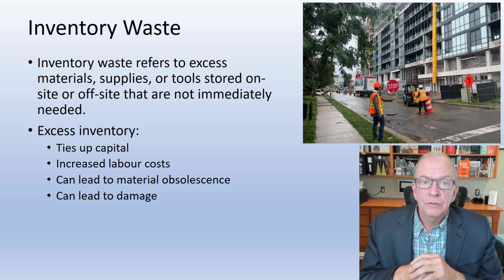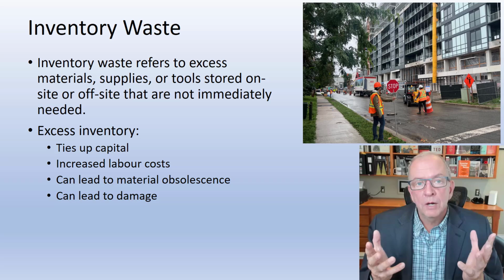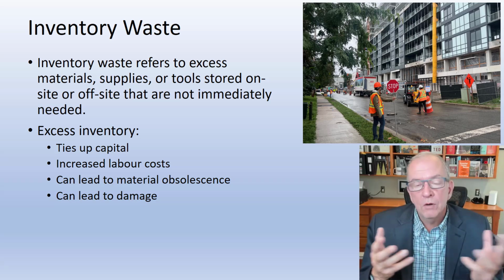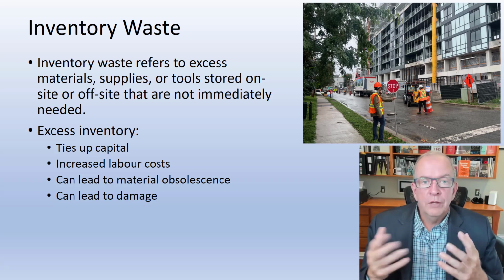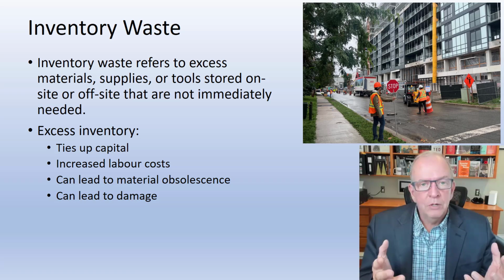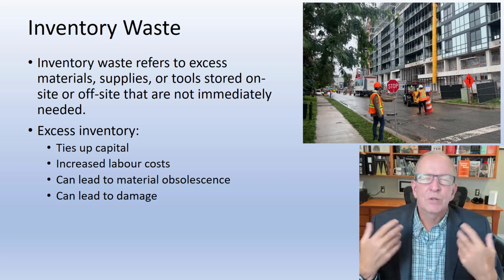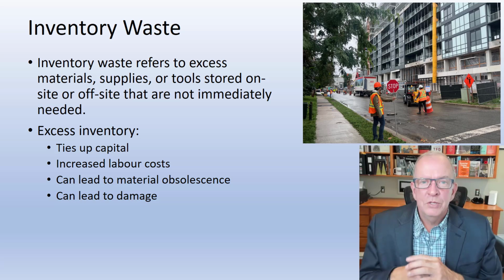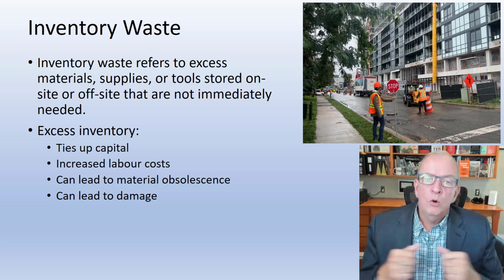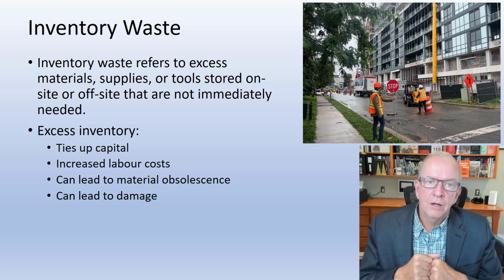Increased labor cost. Well, why might it have increased labor cost, having more stuff that you need on site? Well, you have to consider that it's probably going to be in your way if you have too much stuff. And if you have to move it around several times, that's going to waste a lot of time. I always use the example of, do you want to paint in an empty room, or do you want to paint in a room full of furniture?